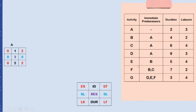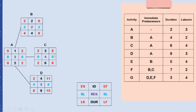As you can see in the table, activities B, C, and D come from activity A, meaning we need to complete activity A first before proceeding. The earliest start for B, C, and D is day two. Two plus four gives an earliest finish of six for B; two plus six gives eight for C; and two plus nine gives eleven for D.